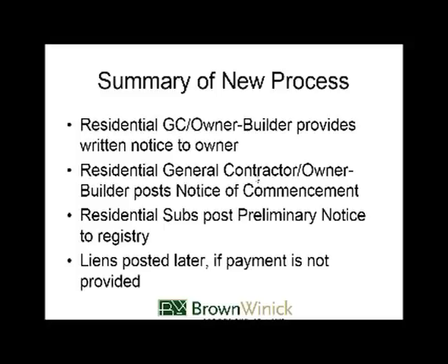The reason it's that way is a general contractor who's building for someone always has his contract to fall back on if a lawsuit is necessary. A subcontractor doesn't have privity with the homeowner, and that's why these statutes were really created. So the protections aren't as necessary for a general contractor, but it is correct that you do have to have an intention to use subs before these kick in.